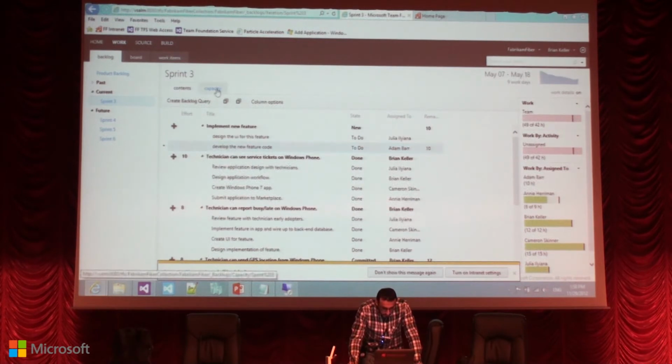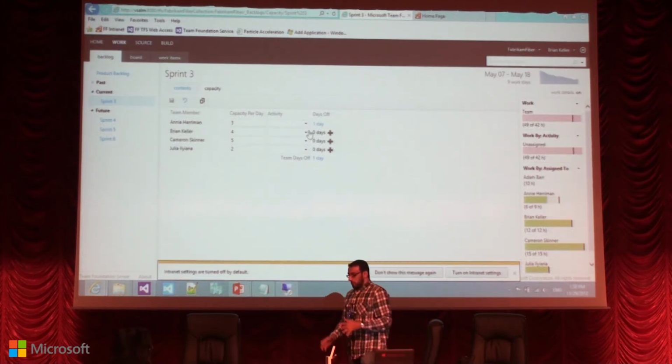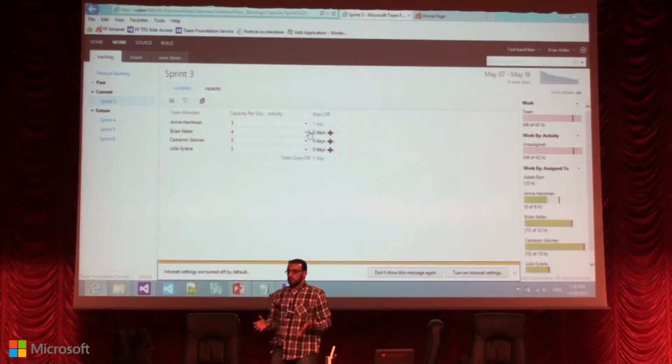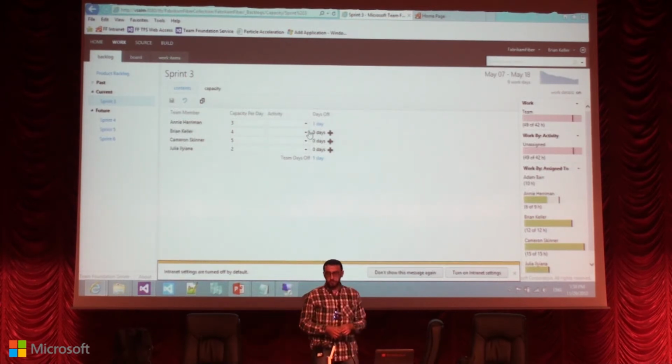So based on this, I can say, okay, my team is over capacity, and I can check the capacity for individual employees. Some people will be assigned to my team 100%, so they work like 8 hours a day, and some people will maybe work 4 hours a day.